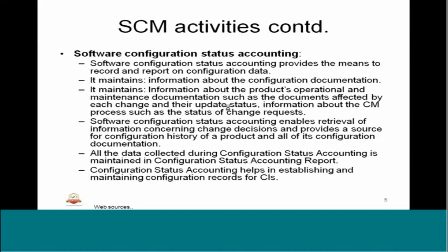So it maintains the information about the configuration documentation. It maintains the product's configuration, such as version numbers or changes done on a particular artifact. It maintains information about the product's operational and maintenance documentation, such as the documents affected by each change and their update status. Information about the CM process, such as the status of change requests, will all be part of the configuration status.